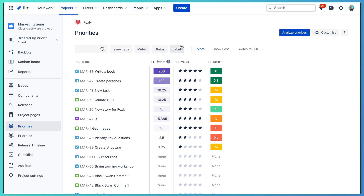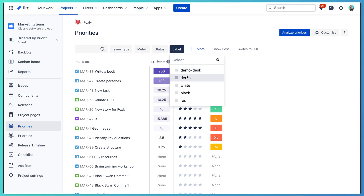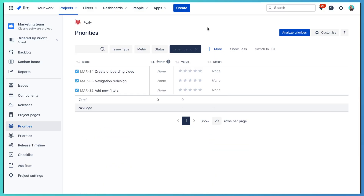Now let's have a look at a real example. I have an example backlog with tasks to prioritize in Jira, and I'm using the Foxly prioritization app for Jira to record our metrics. First, we will be assigning value and answering the question: how does this contribute to our goal? The goal in this case is to decrease churn.